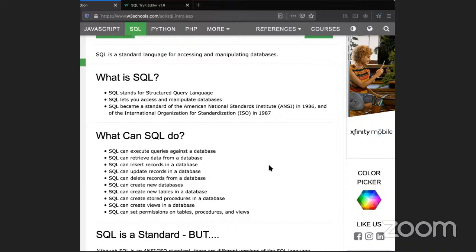Okay. So typically, how would you write a story? That's what I want to be able to hear. So for a role, as a user, or as a whoever you are building it for. Persona, I mean the persona. As the persona, that is the role, and the goal. As a persona, I want to be able to do something, okay? And then the benefit, so that something, okay?